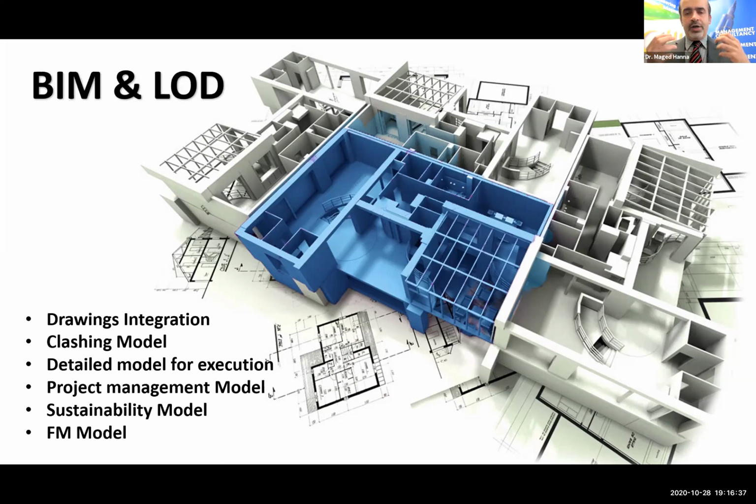So it means that nowadays it has become a necessity to implement all my design drawings into a model, not only to remove the clashes and reduce the risk, but also because it will be helpful for me after 20 years. If I need to replace a certain part of this product, I can open my model and see the part, the specs, and the size, and I can replace it exactly. But remember something: this type of technology is like any other type of technology. I will ask you a question.